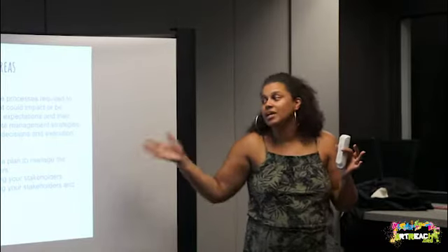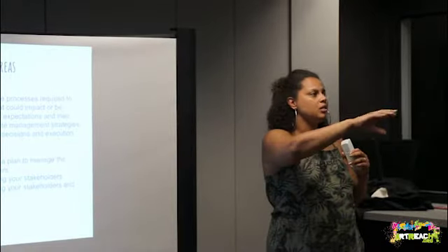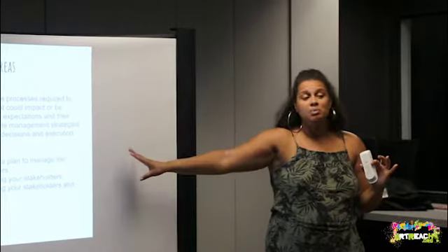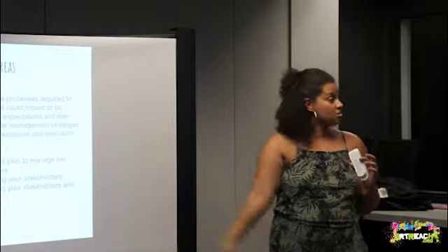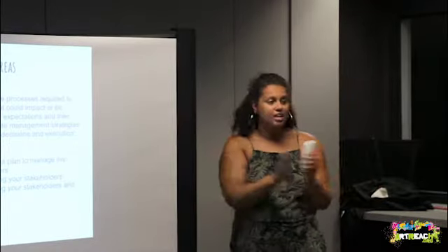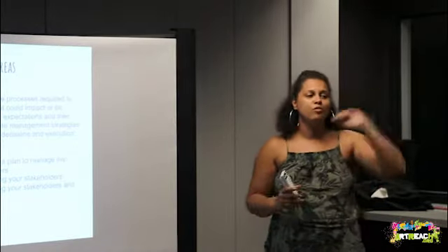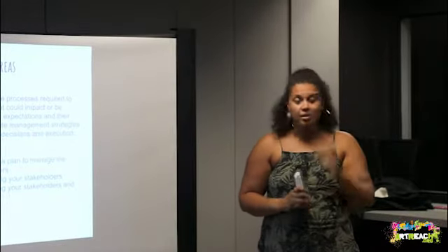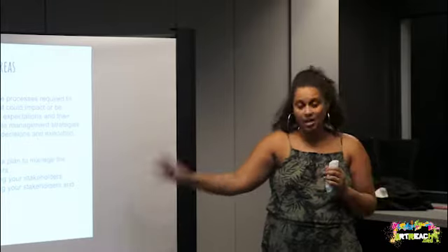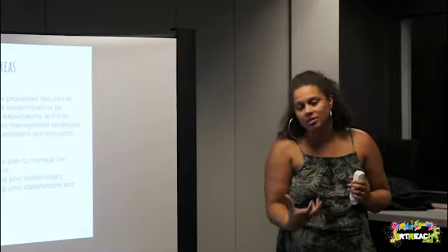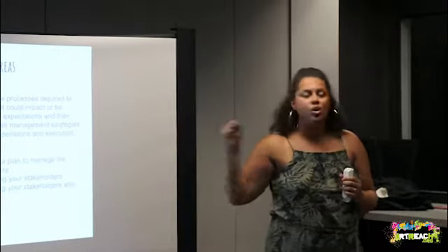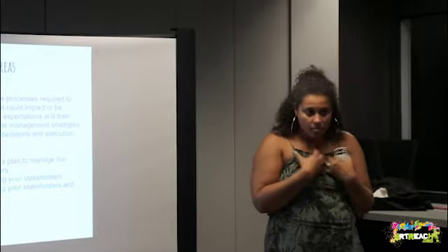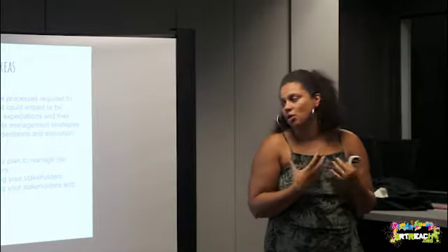And that's because they failed to do the community sessions and whatever. Trust me, town halls, when you fail to do that, and the community's like, no, shut down the project. And that's why you see a lot of those, like, oh, we're zoning for this condo community, because they have to do that. Because that's a stakeholder, and they can shut down the project with enough force. Okay? So make sure your project doesn't get shut down because you failed to identify, bring in, and manage the relationship with that stakeholder.